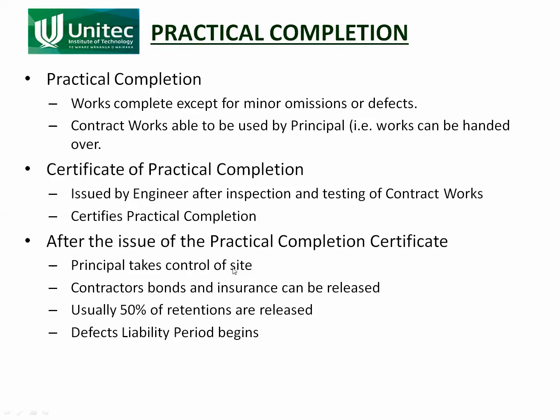Practical completion is a confirmation that the works have been completed, except for minor issues or defects. The certificate of practical completion is a formal document that says the contractor has fulfilled his obligations to build this building, and he no longer has those obligations to the principal.